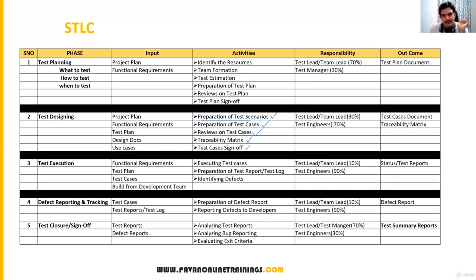Finally, we will get the sign off on the test cases. Everybody should sign off, guys: developers, your team lead, QA team lead, product managers, and customers, whoever has given the requirements to you. From everybody, we have to get the sign off on the test cases, and only then do we proceed for execution. Until we get the sign off, you should not proceed further. Sign off is very, very important.